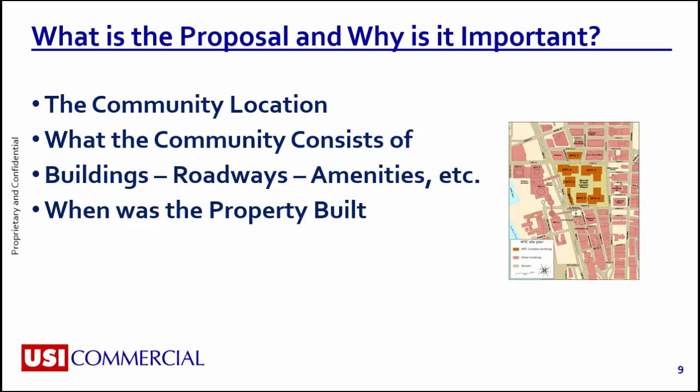Once you feel the report is an accurate tool to work from, use it to help establish your budget for the upcoming fiscal year. The reserve allocation makes up a large portion of the total monthly assessment, and this report should help you determine the correct amount of money to go into the reserve fund. Additionally, the reserve study should act as a guide to obtain proposals in advance of pending projects. This will give you an opportunity to shop around for the best price available.